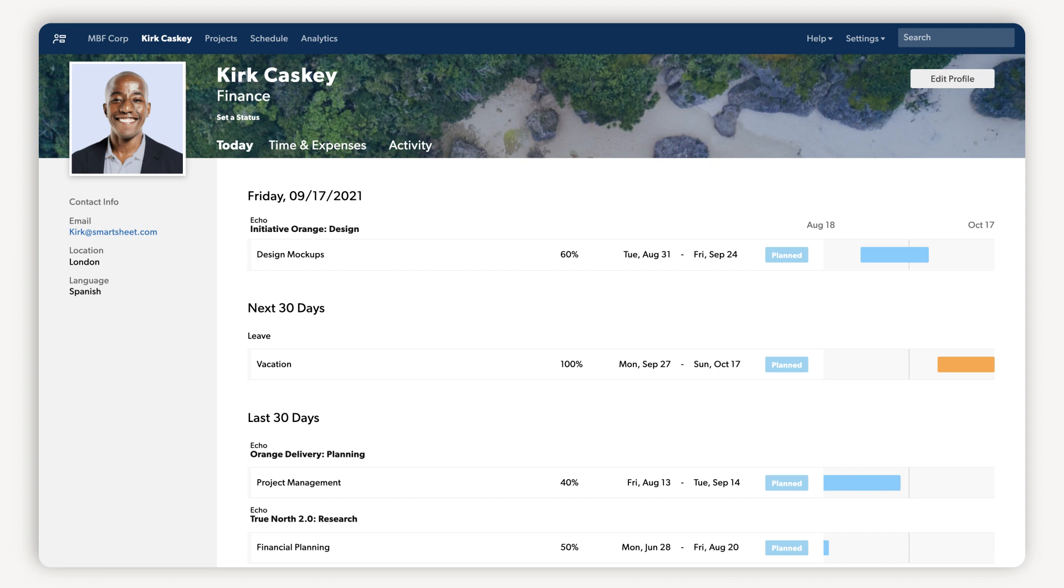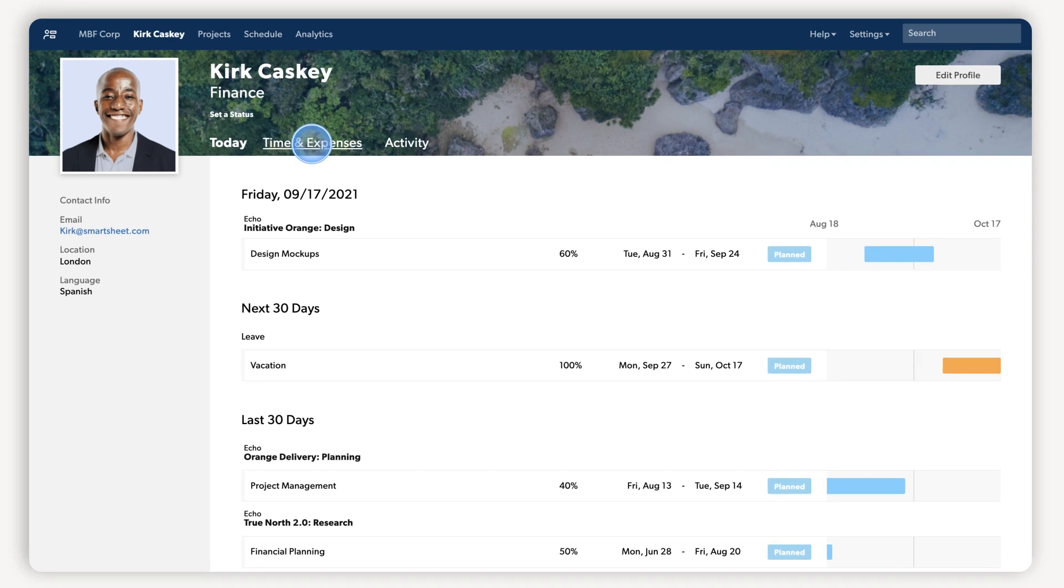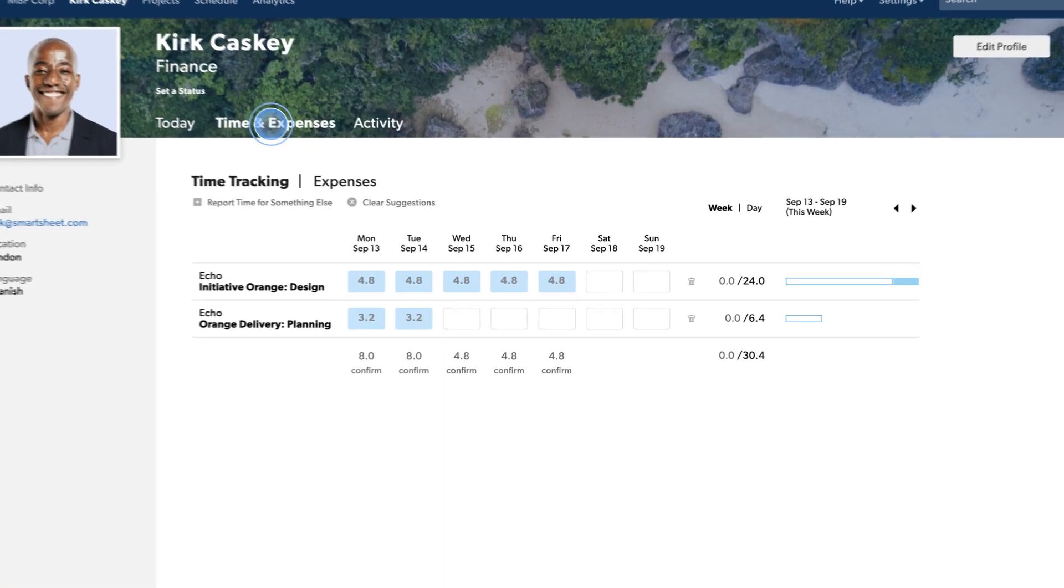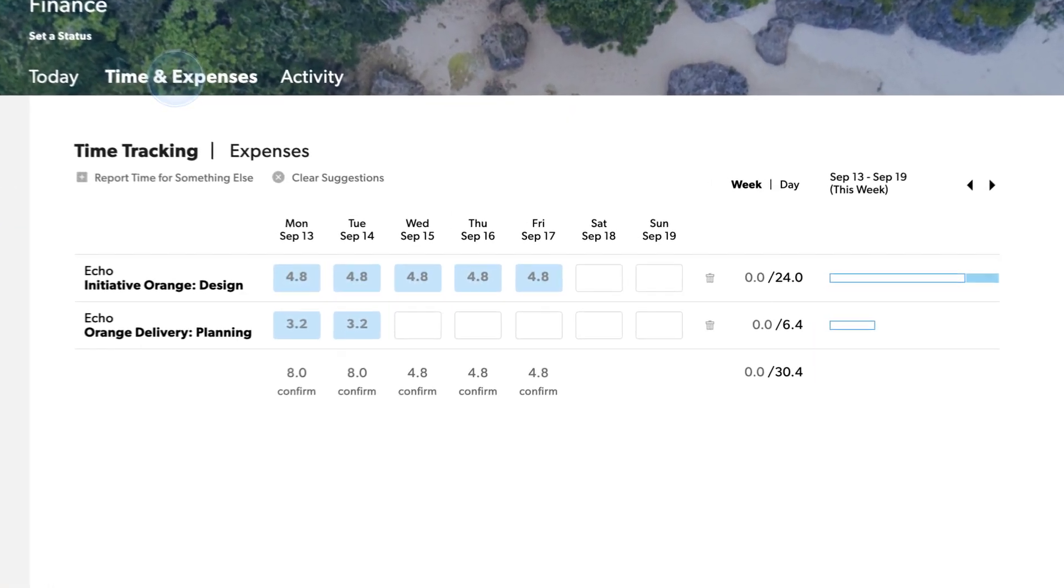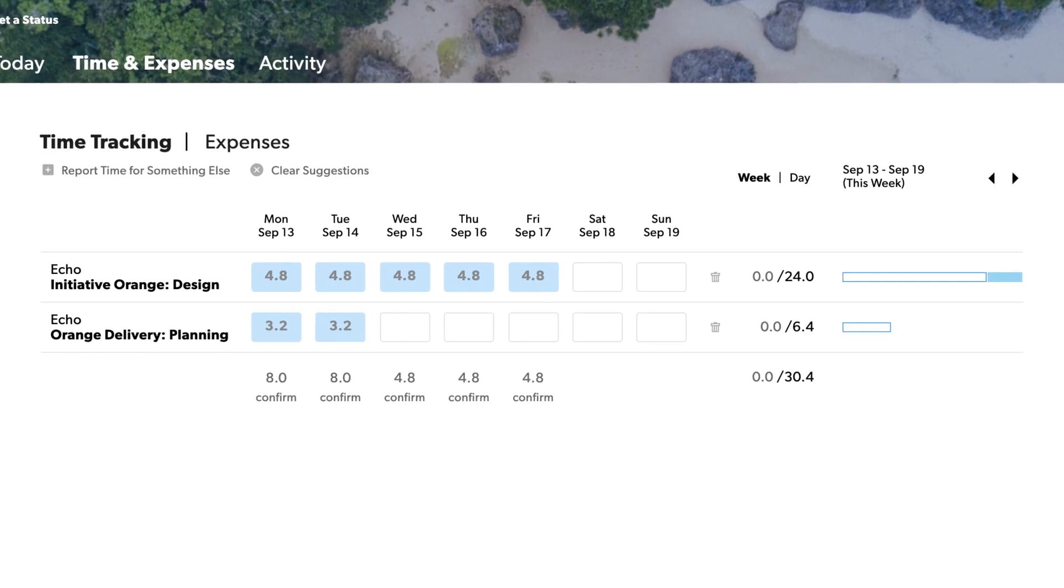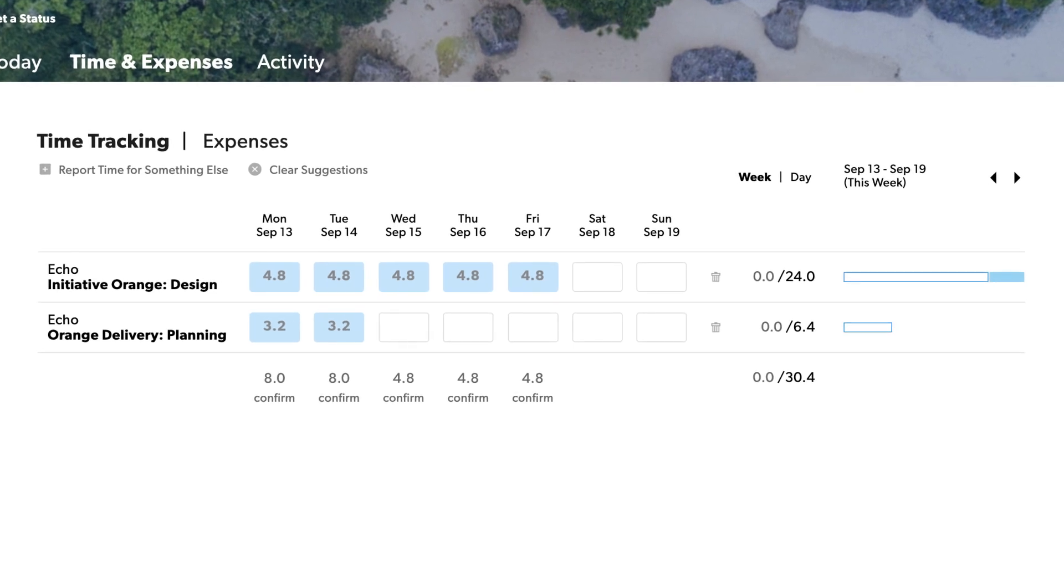And with pre-filled, one-click timesheets, team members can track time and expenses so that project managers always have an accurate view of planned versus actual, allowing them to spot and resolve gaps before they become bigger issues.